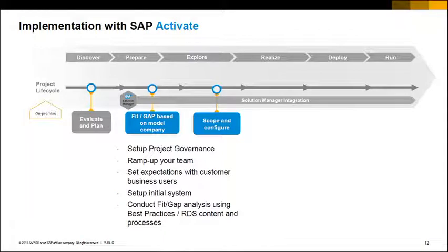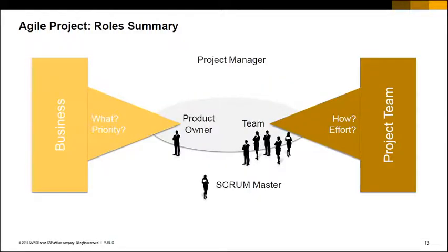And in the prepare phase is where you would create a model company, in a sandbox environment with the best practices, and conduct client workshops to validate that solution. And wherever we have a gap, we put it in an agile backlog, and then in the subsequent phases we realize that backlog.